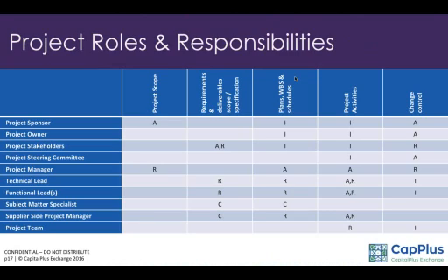In terms of time, a project manager, I would say, has to be full-time, depending on the size of the project. If not, I have usually seen projects fail, especially large projects. There has to be a full-time project manager. The technical lead and functional lead can come and go, but when they are assigned during a certain period of time, it has to be full-time.